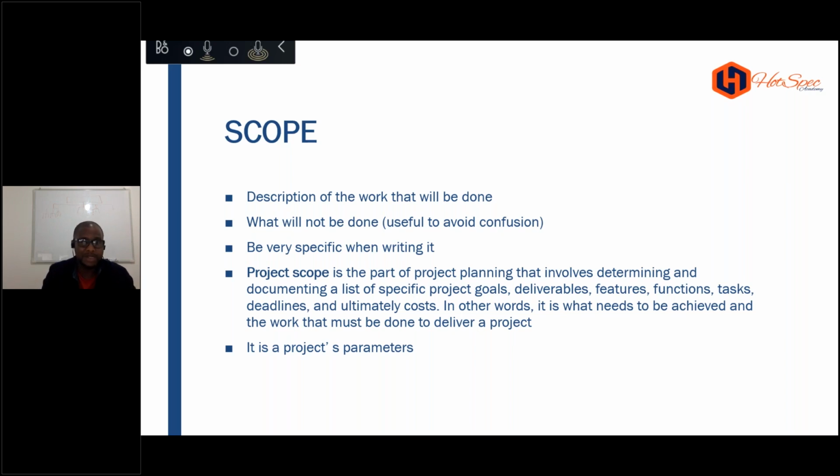So you've got to ask to understand. So when I'm developing my scope of work for that kind of thing, I'm going to be furnishing your house, just to clarify, furnishing the living room, providing this and this and that. That's in scope. Out of scope: furnishing of the bedroom, furnishing of the kitchen, of the study room, and so on, is out of scope. So I know what I'm supposed to do. That's covered. I'm covered.